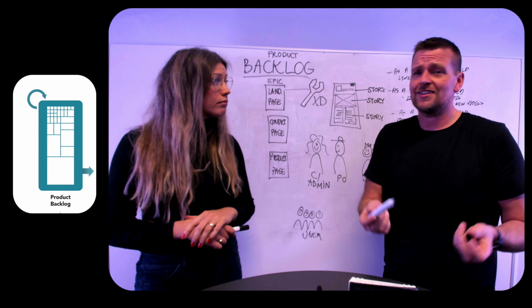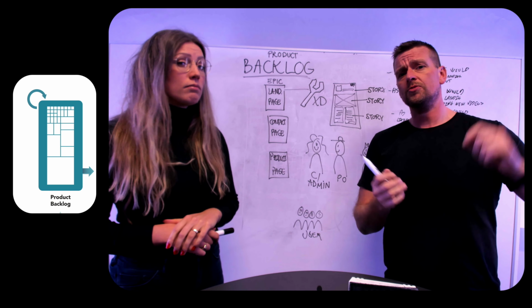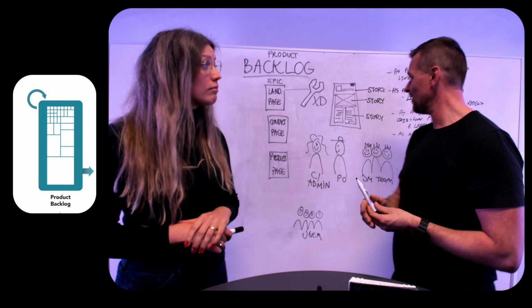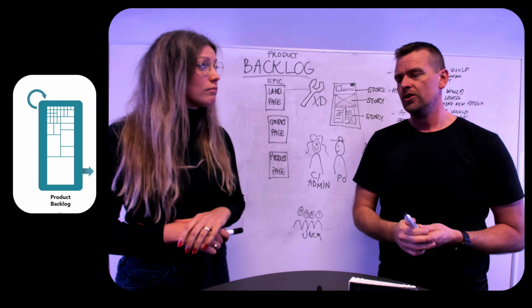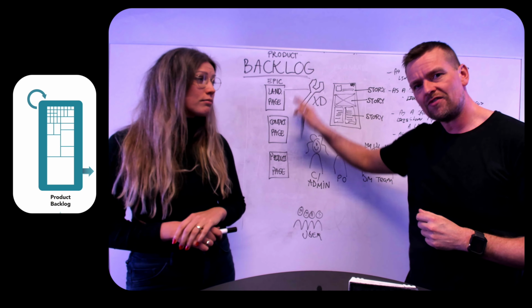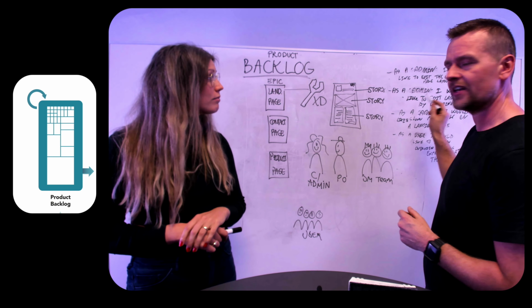So already you guys can see this single story, the epic story right here, is starting to emerge into multiple other stories. And you need to keep doing that until you feel that you are comfortable with the user stories, and then you can let the customer go, right? Notice I'm only focusing now, not on the entire product, not on everything in here. I'm just focused on one epic story, and I'm trying to break that down.